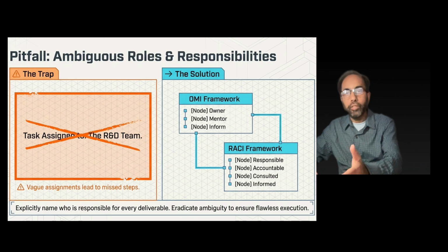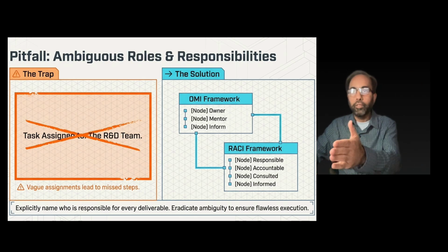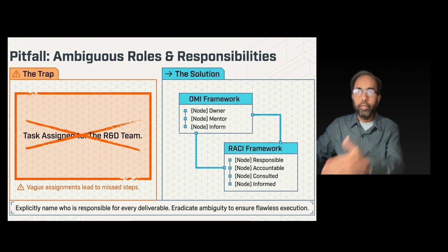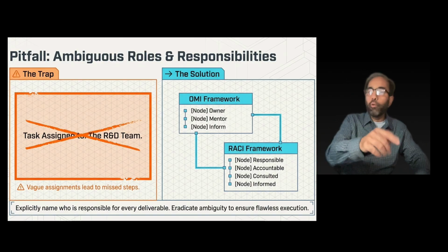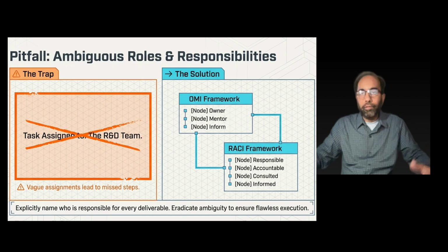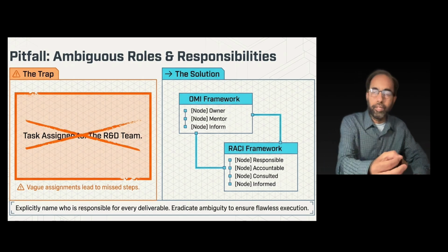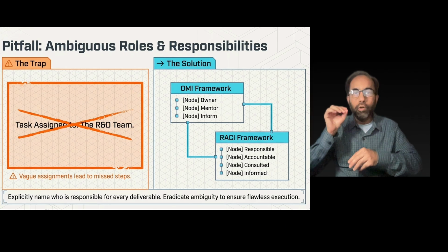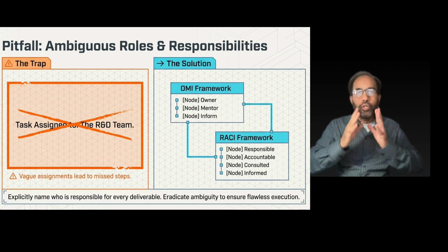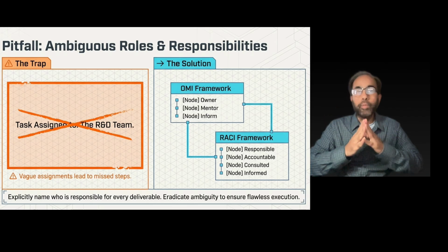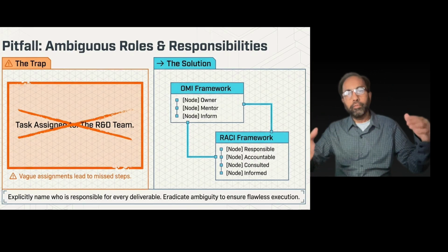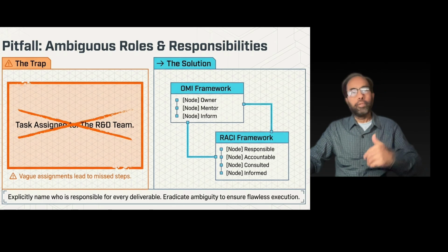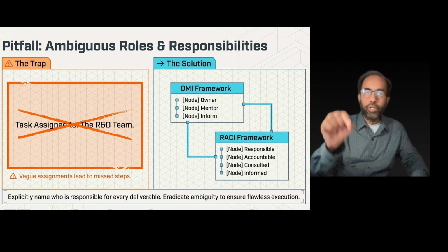Now, there are other methodologies also. You can assign as responsible, accountable, consulted or consultant, and the person who is informed, information only, the RACI framework. Like you said, a lot of times I use my OMI framework. I personally like to call it owner, the person who is owning that activity. By having an individual owner for each task, you ensure that the task is getting done. It will be done because there's ownership by one person. There might be a number of people helping from the consultant point of view, from the support point of view, but there has to be ownership of each task.